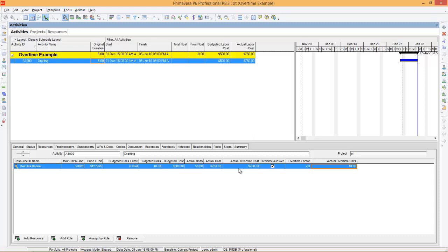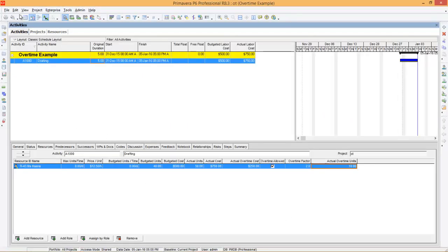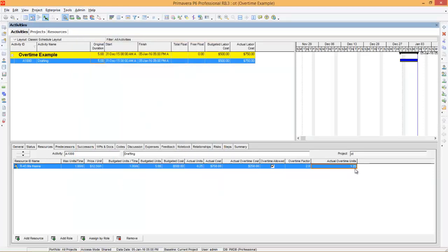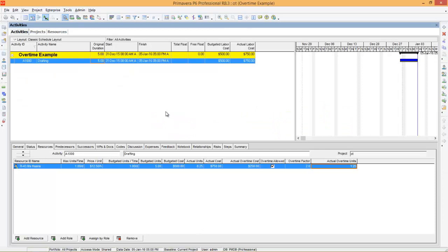In the slide I told you, you can enter actual overtime units as 10 if unit format is set to hours. Now see what happens when I change user preferences unit format to days. When I change it to days, you can see actual overtime units recalculates to 1.25. This is the calculation: 10 divided by 8 (it is an 8-hour calendar) makes 1.25. So this is how the program calculates the overtime.